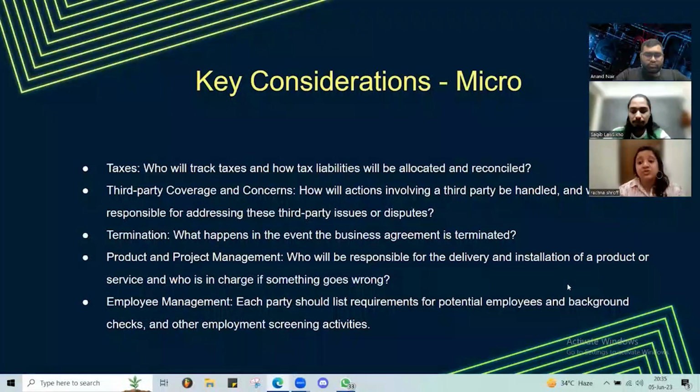There has to be a particular person who should be named for it. You can actually draft a table and, under different headers, put different people's names. In terms of taxation, it will be the finance manager. For the project itself, the project manager. In terms of particular services in that agreement, this is the person who's supposed to give you all the reports and the performance idea. You can create such charts, which I have done, and I have seen it come from one of the world's largest advertisement companies, a brand agency whom we were dealing with. It's one of the best brand agency companies. They also create such charts, and it makes things very easy. It's specific, it is project related.